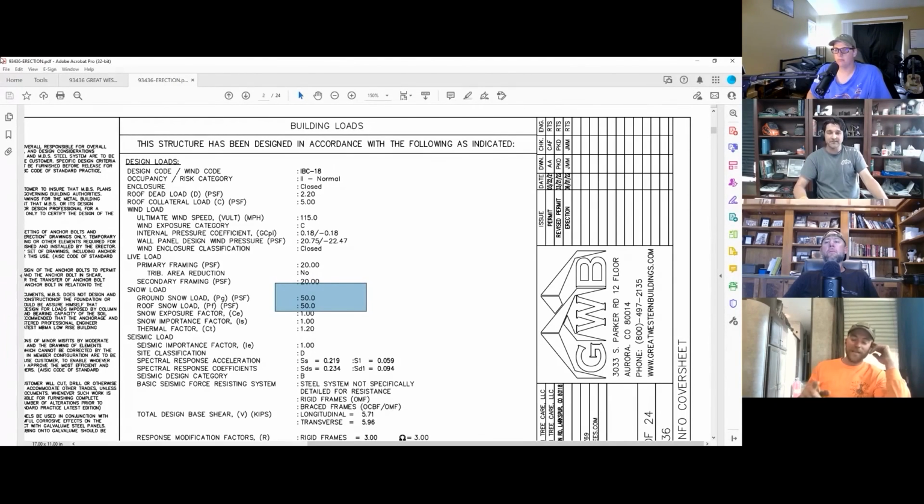Congratulations. And time is money, and that's what it comes down to, if you can rent the equipment and keep the equipment on site for the time that you're doing it. I get plenty of customers that want me to put the building up, and I give them a price and they go, oh man, that's too expensive. Well, it's going to take me 2 weeks to put your building up, but it's going to take you 2 months, and you're going to pay for that rental equipment. By the time you're paying for 2 months' worth of rental equipment, I could have done it, saved you all the headaches, and we could have moved on.